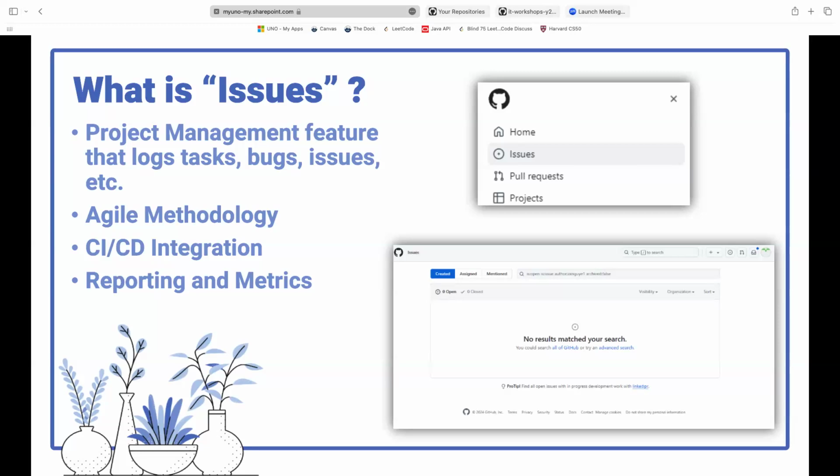This project management goes really well with agile methodology. Drew touched on it a little bit, how you have teams that are in progress on stuff and sometimes they go to testing. That can be part of sprints in agile methodologies, where you work on these tasks in your backlog for two weeks or whatever. Usually sprints are at least two weeks long. If at the end of that sprint things are going well, you move on to the next stage, which could be production or testing. That also ties in well with continuous integration and continuous deployment. You could also use this to report different statuses and metrics.